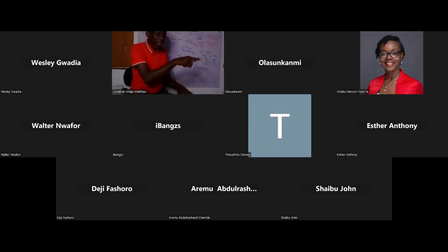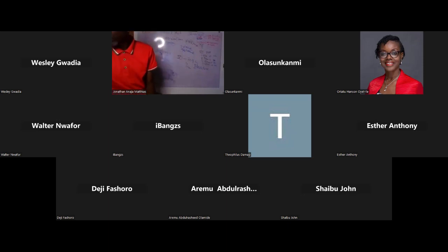Then I will carry the beam, isolate the beam, carry my drawing, carry my design, and say, no, could it be that this quantity? So that was how I discovered it, Mr. Ini. It was past record. The percentage was just way too high. So I narrowed down on it. That was a red flag for me. And I picked the drawings and the structural drawings with my team, and we discovered that the beams were overestimated.